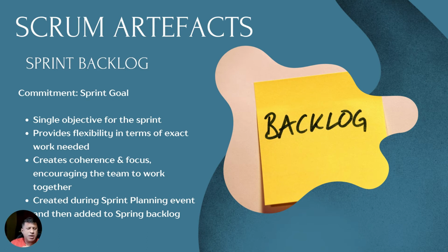And you remember the point we discussed earlier. Whatever changes are coming through from the product owner, or other stakeholders through the product owner, as long as they do not alter the sprint goal, it is well within the purview of Scrum to accept that change.